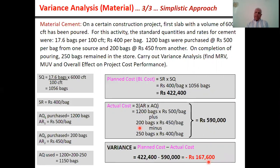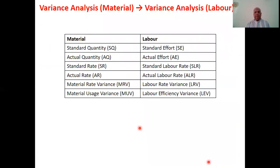Now let's transition from material to labor. Here is a comparison of terminology: standard quantity becomes standard effort; actual quantity becomes actual effort; standard rate remains standard rate; material rate variance becomes labor rate variance; and material usage variance becomes labor efficiency variance.